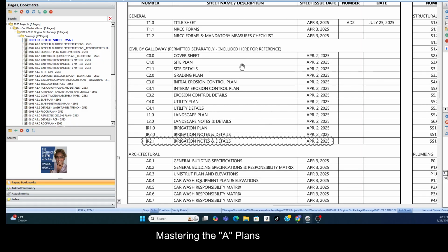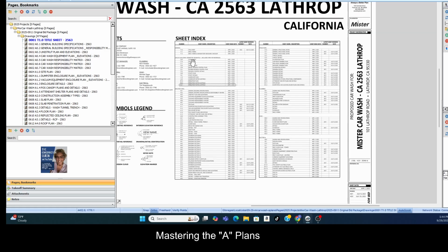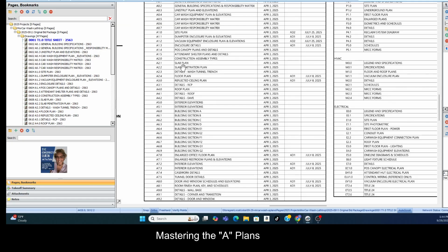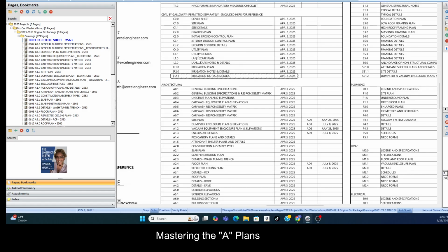And so we know by looking at the sheets that are comprised within the sheet index, the list of sheets comprised within the set, we can tell what trades we need. The project manager can solicit the right contractors for bidding day. Okay, and so, yeah, sheet index, vital information. What contractors do I need? It gives us all of that information.